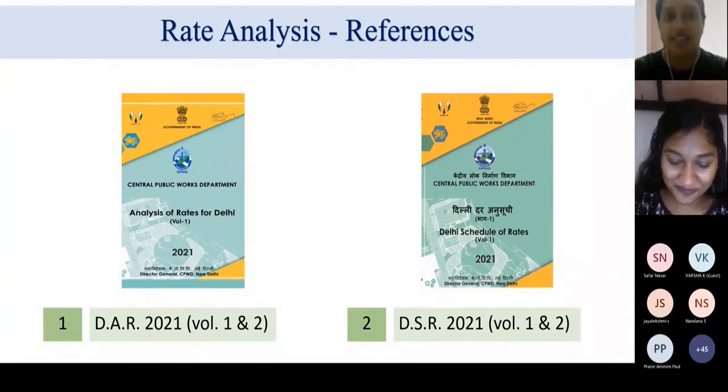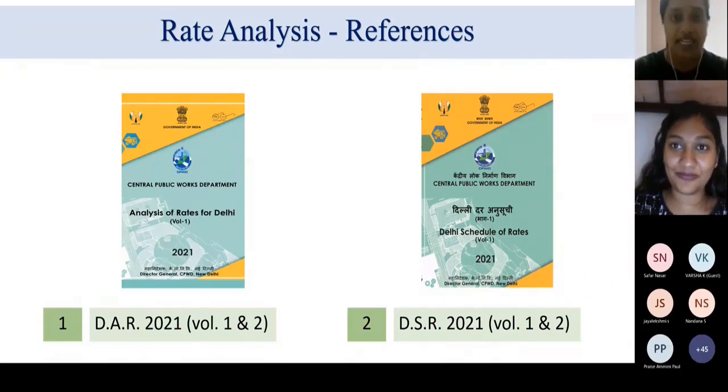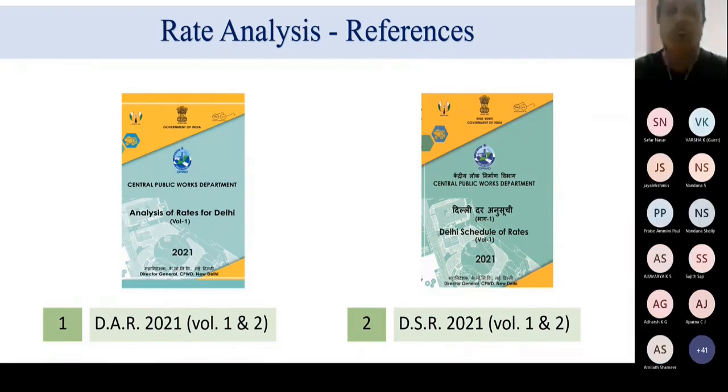So as I was saying, execution of work is also a part of rate analysis, wherein you have to decide whether you are employing people to complete the work or you're going to employ people and machineries, a combination, to complete a work. I'll give another example. You're supposed to cast a slab for a building. You can do it either way.